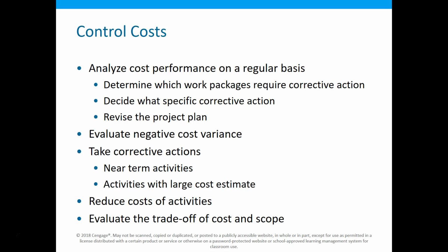We may look at ways to compress time. So how do we also compress time? Maybe I have another construction crew that's finishing up work and I can move them in on that job. If I can compress time and actually make the project more efficient, I might also be able to do that, because that value is also based on how much time there is. So I can renegotiate what the scope of that is.